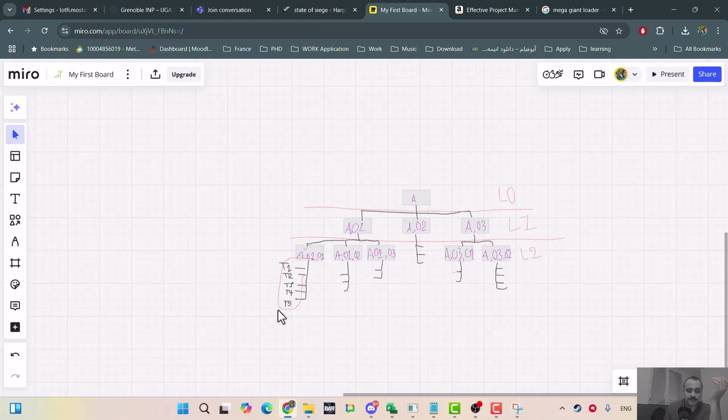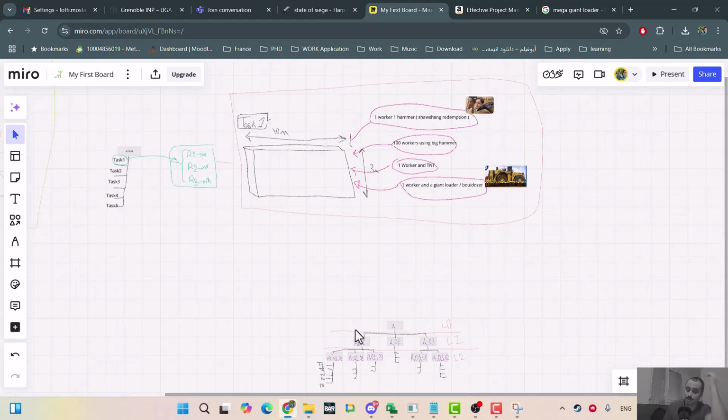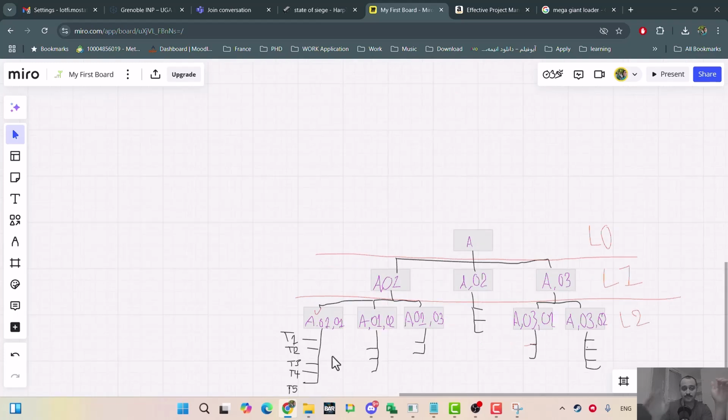Okay, so what will happen is, for each task, you're going to follow this process: identify the list of resources that are required, and also decide who or what exactly is going to handle the job, and get an estimation from them. For example, you discuss and say, if you are responsible for this task, you need to tell me how long it will take to complete.